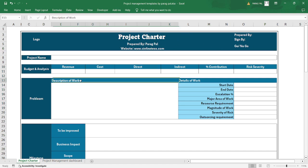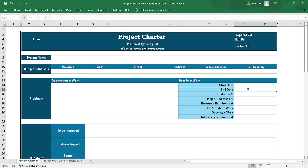The project charter includes a description of work — defining the problem, start date, end date, and how much escalation is considered over the time period. It covers the major area of work, whether construction or railway, resource requirements (higher, lower, or moderate), and the magnitude of work. For example, a five million project may be classified as major, one million as moderate, and 0.5 million as lower magnitude.